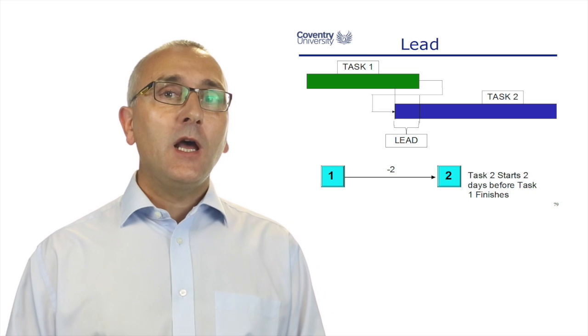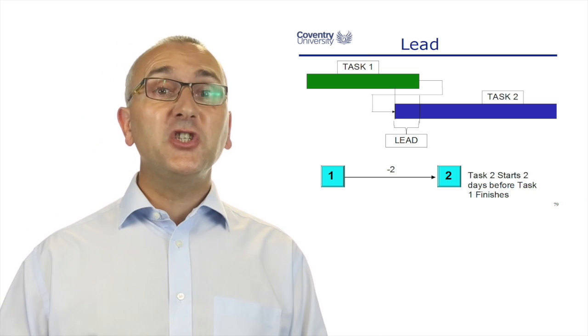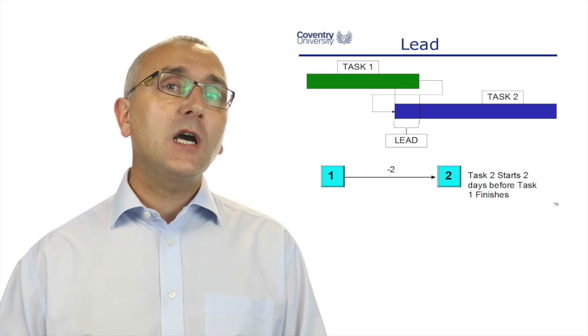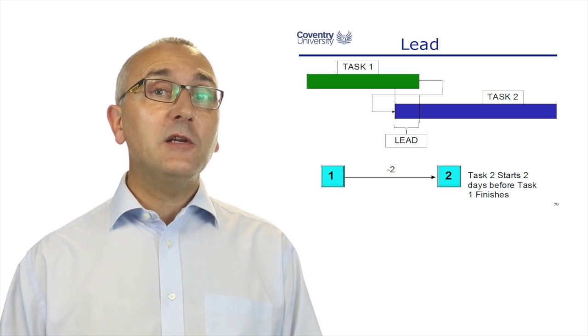Some examples of this. If task one is producing some castings that are machined in task two, we can start to machine the first casting before number five casting has been completed.